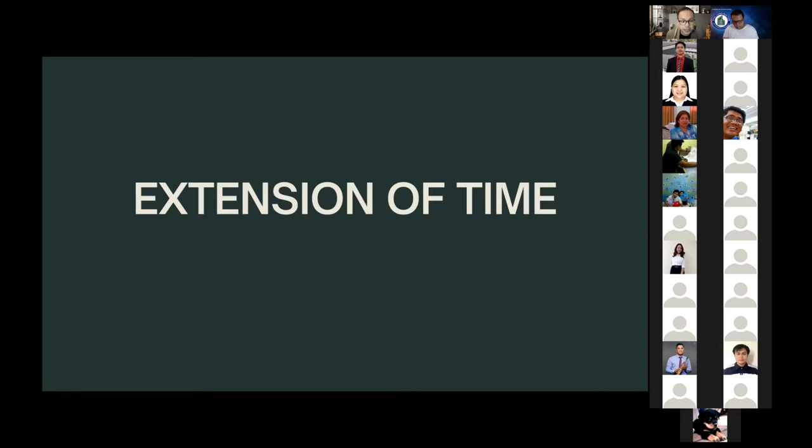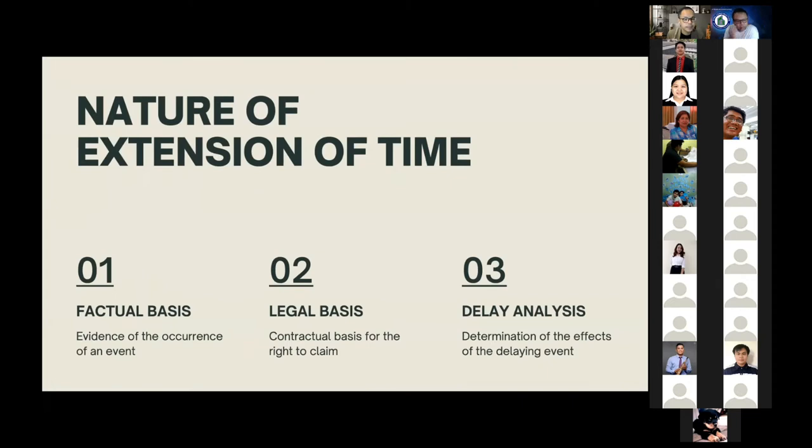This section will explore and discuss the legal basis for the extension of time and its legal underpinnings, and other issues surrounding extension of time. So extension of time clauses are indeed important as they preserve the rights of the employer to recover liquidated damages and enable the contractor to be informed of their financial exposure when delays occur.